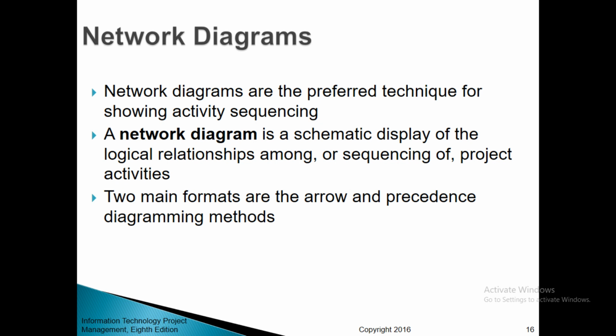Network diagrams. Network diagrams are the preferred technique for showing activity sequencing. A network diagram is a schematic display of the logical relationships among, or sequencing of, project activities. The two main formats are the arrow and precedence diagramming methods.